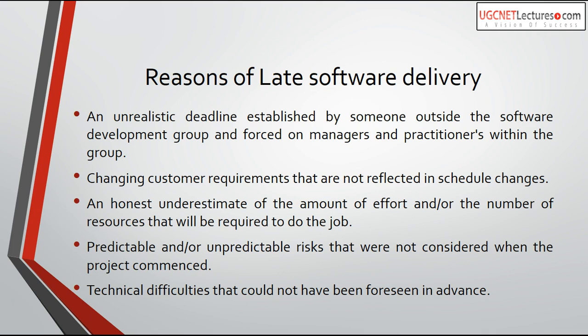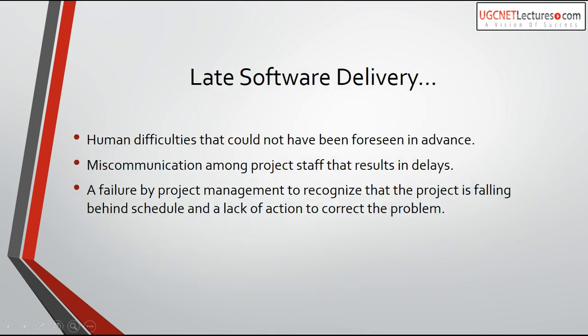In the software development process, a lot of risks are involved. If you ignore the risk, your software may go beyond the deadline. Risks definitely exist in software development and we must account for them. Technical difficulties that could not be foreseen in advance — for example, the available tools may not be sufficient for developing a particular software. Human difficulties that could not be foreseen in advance, such as miscommunication among project staff, can also result in delays. Finally, a failure by project management to recognize that the project is falling behind schedule, and a lack of action to correct the problem.